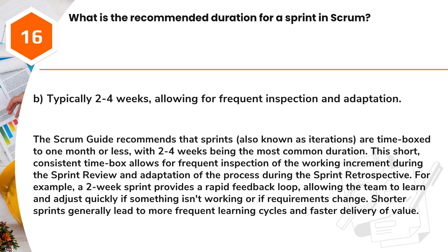For example, a 2-week sprint provides a rapid feedback loop, allowing the team to learn and adjust quickly if something isn't working or if requirements change. Shorter sprints generally lead to more frequent learning cycles and faster delivery of value.